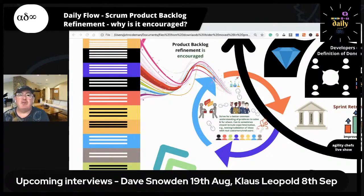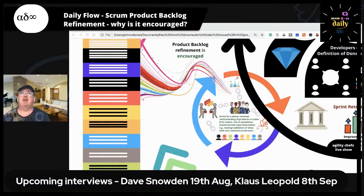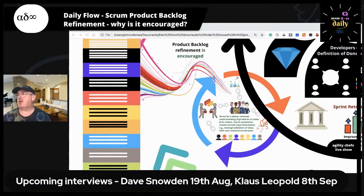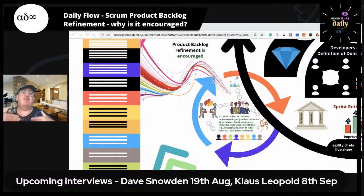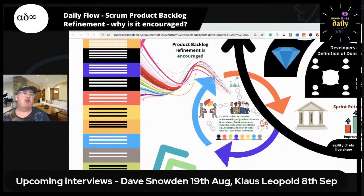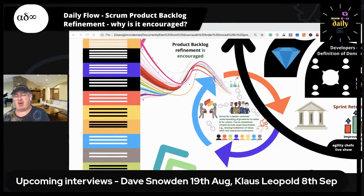What I prefer is that Scrum teams do backlog refinement on a regular basis — for me, once or twice a week, maybe one or two afternoons a week, on a voluntary basis, with representatives from each team if you're in a multi-team context. You're doing a Pac-Man job, breaking down what's coming next and understanding the next two or three sprints. If you're depending on people using waterfall with a four-month lead time, you might need to do backlog refinement five months out. Your look-ahead will depend on who you're interacting with, but normally two to three sprints — two to three months.